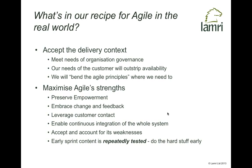As systems get bigger, we need to make sure we keep continuously integrating the system as we build it sprint by sprint, and continuously integrate and test the whole — that's really important. We must also ensure that each sprint we not only test the new stuff that came out in the sprint, but also regression-test everything we built before. It's about doing the hard stuff early so that by the end of the project you've regression-tested earlier work so many times that you're massively confident in the quality of the end product.